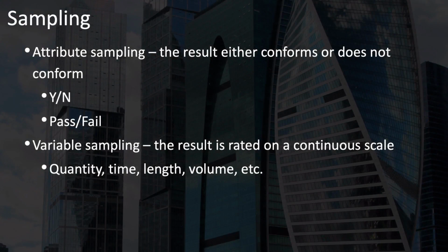If you're building quality in, you usually don't need to inspect 100% of your outputs. There are some cases in high-risk safety areas that you will, but most of the time, you won't. Instead, you'll be taking samples, testing and measuring these samples, and applying statistical methods and quality control tools to the data that you get about these samples in order to generate information about your processes and outputs.